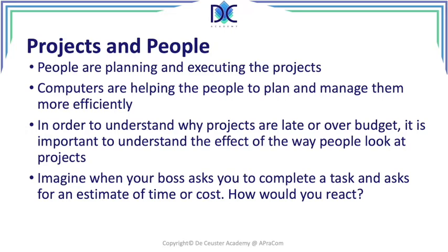I remember my boss standing at the coffee machine. Typically in the US it would be at a water cooler, but in AT&T Belgium we had a coffee machine, and it's what I call the coffee machine dilemma, or the water cooler dilemma. And he asked me, can you give me an estimate of the cost of this possible addition to a network connection? I said, well, I expect this to cost so much, plus or minus, or I said rough order of estimate, which is plus or minus 75 to plus 100, depending on the company that you're dealing with and what the norm is in the company.